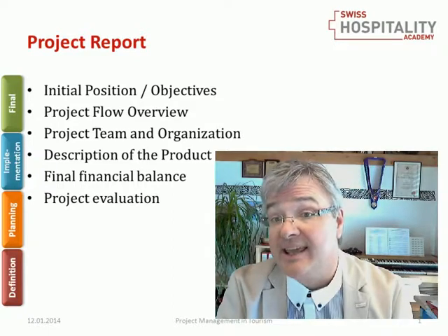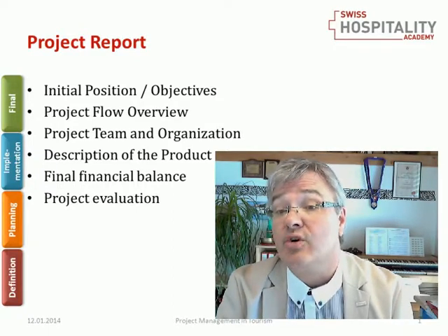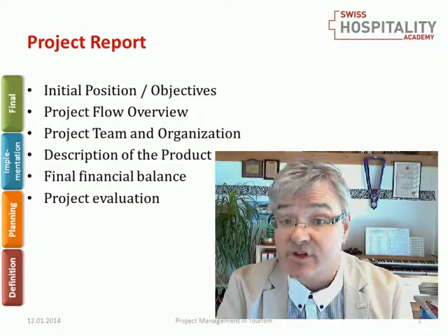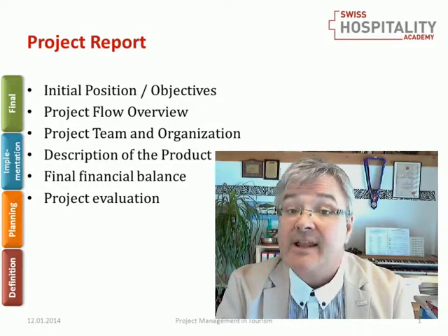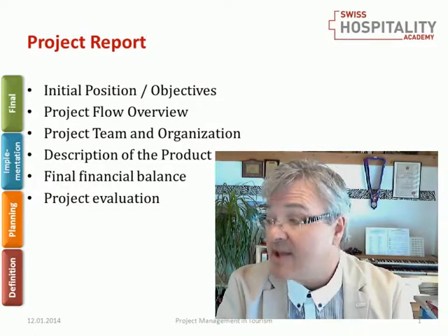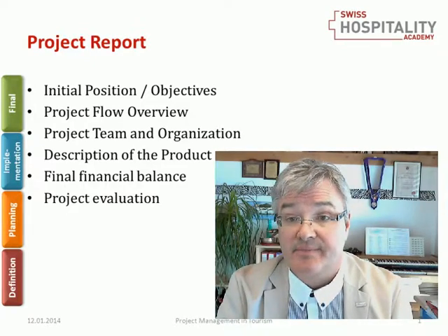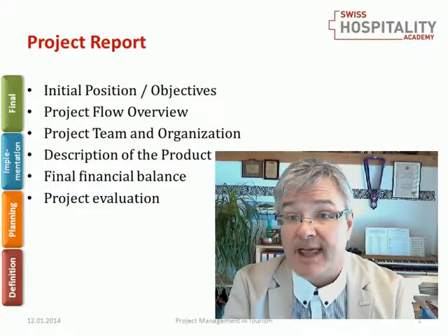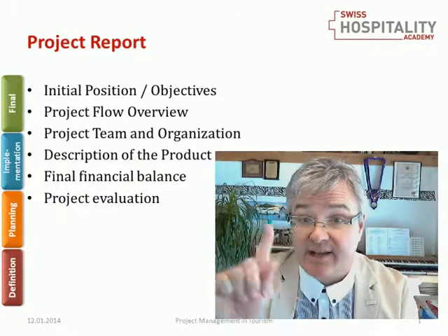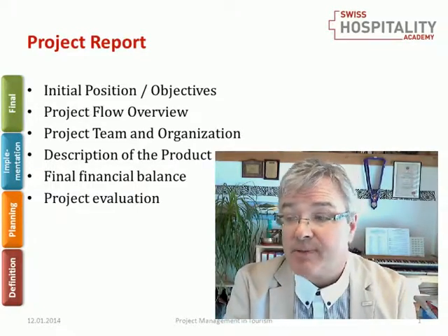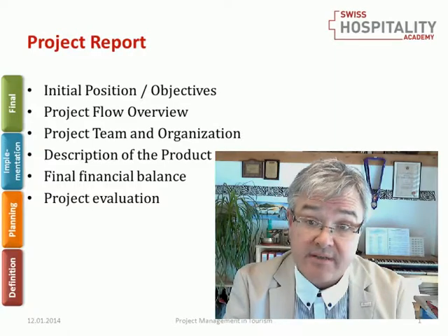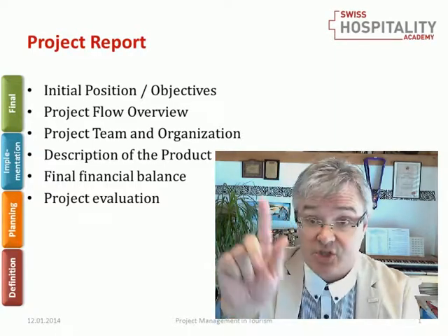First, we call this verification, the first part of the evaluation. The verification shows whether we reached the project objectives. We wanted to plan a hotel. We have a hotel. Done. We wanted to plan a hotel with 100 rooms. We have 120 rooms. Done.